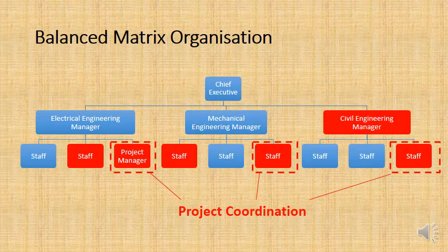Now, in this case, the civil engineering manager, he's in red, he's involved in the project. But who's he reporting to? Well, he's actually reporting to the project manager as far as this project is concerned. So even though in the organizational hierarchy he's below the department manager, the civil engineering manager is reporting to him.